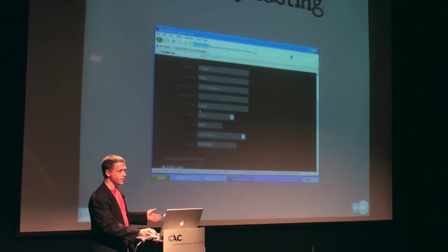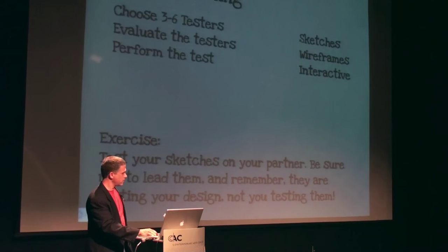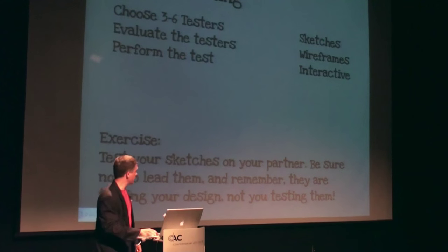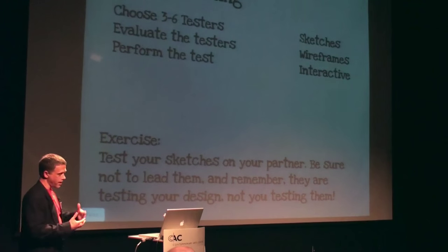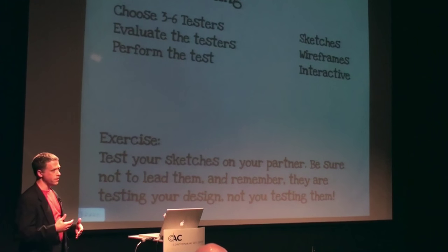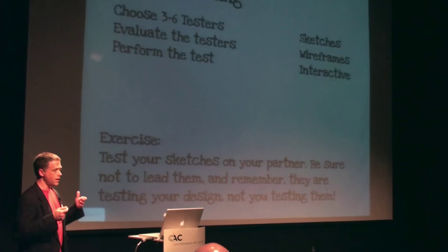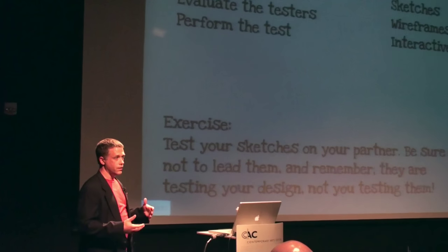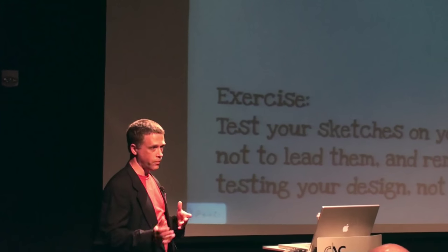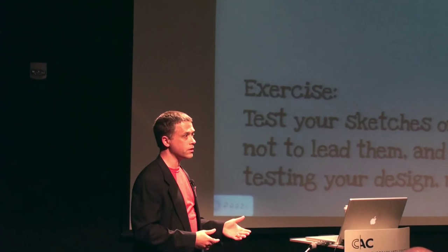where those issues are. And so, again, sitting down with the user, walking them through scenarios, giving them tasks, recording that stuff, making observations, you can discover a lot. And it doesn't take a lot to discover those things. So, again, in a highly collaborative environment where you're maybe in an agile world where you're working on 3-week sprints and you don't have a lot of time to do this kind of thing, you can test it out with 3 to 6 users, just get some feedback, and keep moving, introduce new stories to accommodate for those things, and just keep moving through.